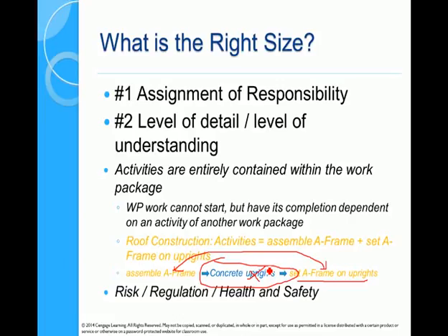Some of the reasons is obviously for scheduling, as you saw there, but managing risk, that means you don't want somebody doing the paving underneath when somebody's setting the A-frame on the uprights. You know, there might be a risk or a health and safety problem with that.